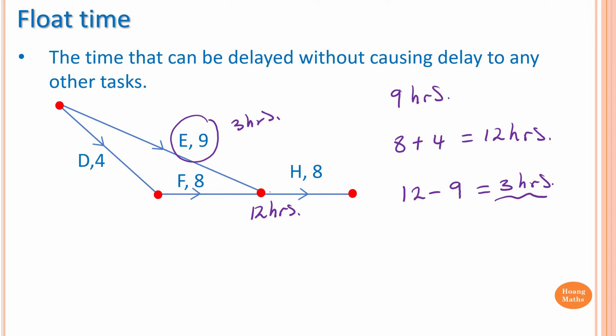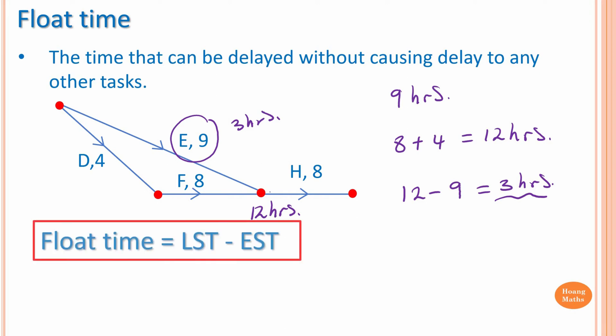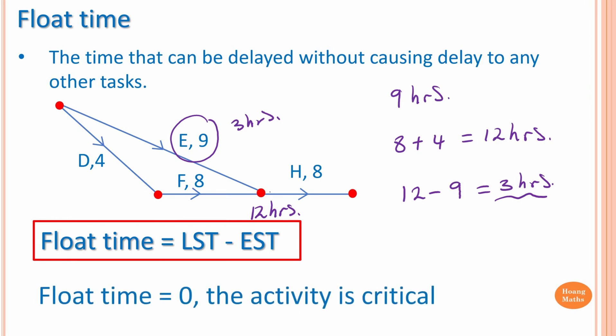In other words, activity E can start three hours later without delaying any other activities. Float time is the latest starting time minus the earliest starting time. Please take note: if float time is zero, the activity is critical. This will help us find the critical path.